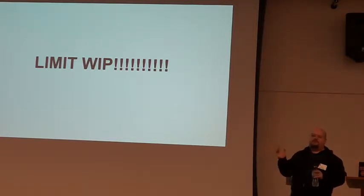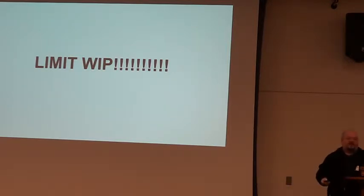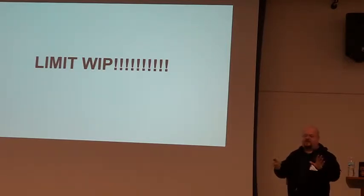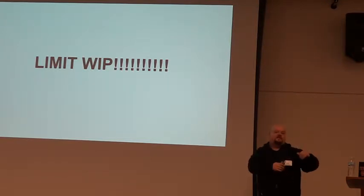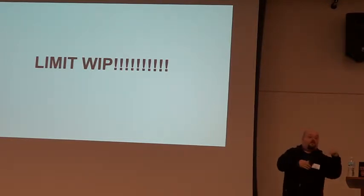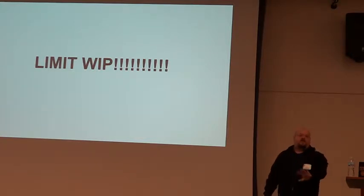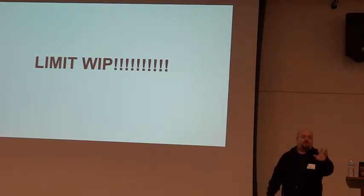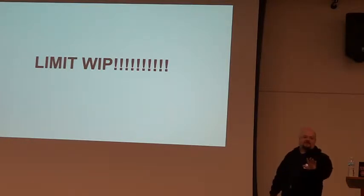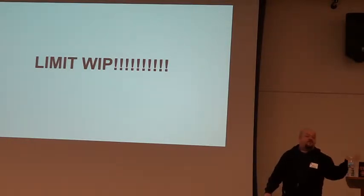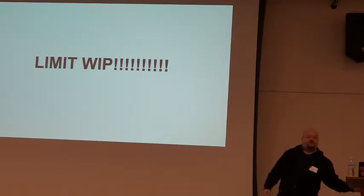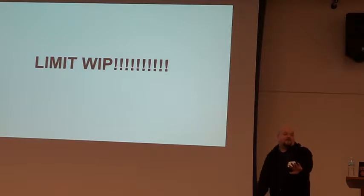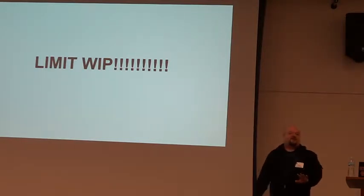What this really comes into is that, so let's say we're going to plan a project. We're going to write out the 50 things that need to be done. Okay? We may go through and know that our team can move five cards across a board, let's say in a week. Let's say they can all do one card a day, a week. We've got five members of the team. We've got 50 cards. There is no sense going through and bothering with all 50 of those tasks right now. Because we're only going to get five done this week.